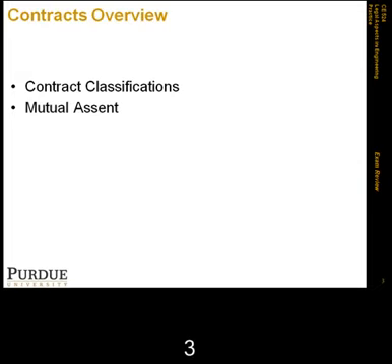In mutual assent, we also talked about contracts by correspondence. We talked about what we call the mailbox rule, where the offeree, if they use the same exact mode of communication and have the correct address and postage, would have their acceptance effective immediately once they place it in the mailbox or in that same means of correspondence.